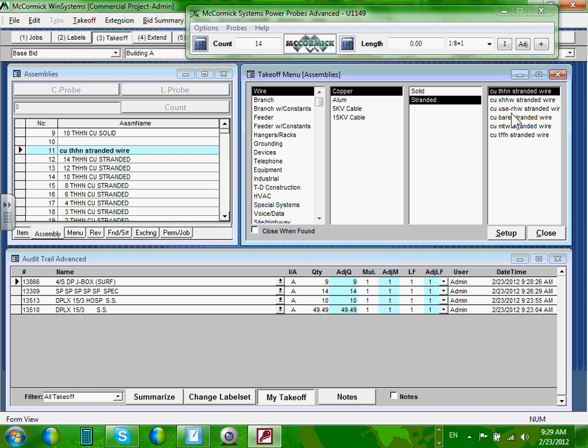What you see is what you get. If you take 100 feet of number 14, look at this. Click on that. See, I have no number 14, God forbid, we don't use it. Number 12. Number 12, THHN stranded, right? If you put 100 feet, it's actually 100 feet. Done. What if you have 3 of them, 4 of them, right? You have to multiply by 3 or 4.